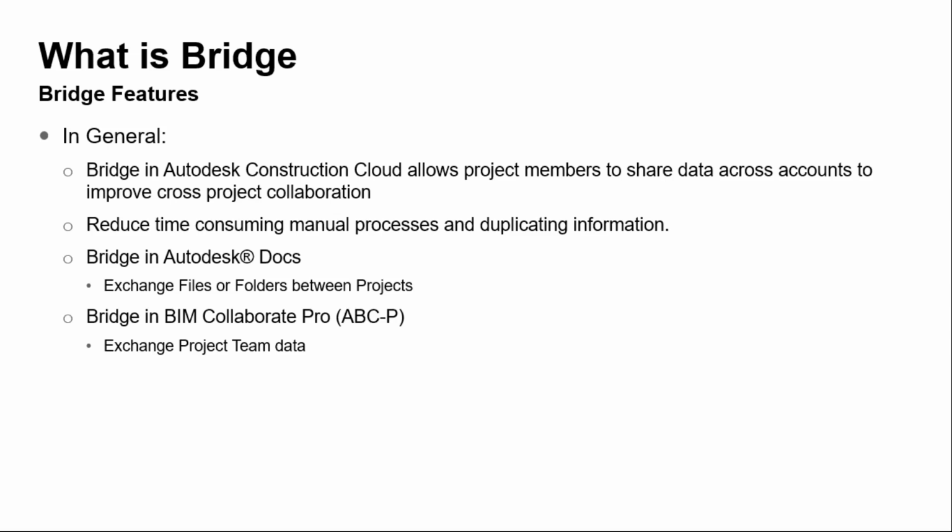Autodesk Docs provides the capability to share files and folders, whereas BIM Collaborate Pro provides the capabilities of leveraging the design collaboration workflow across projects by connecting shared packages via the Teams Share and Consume workflow.